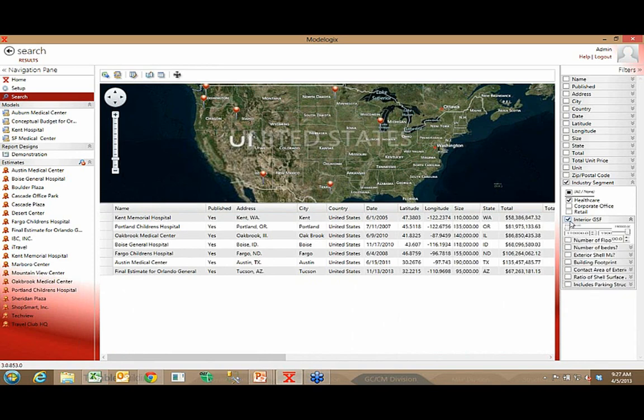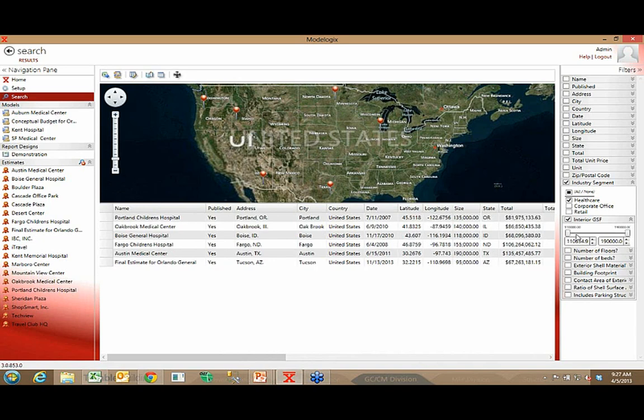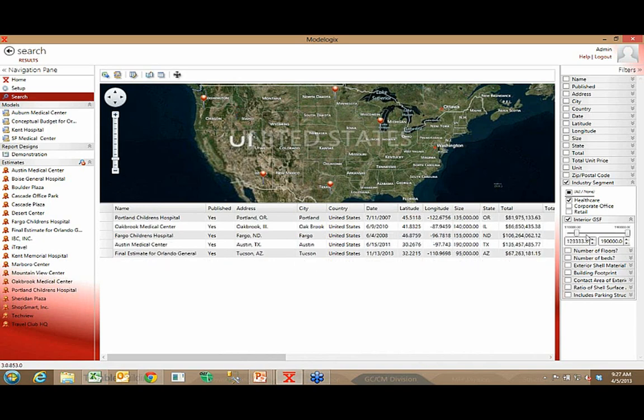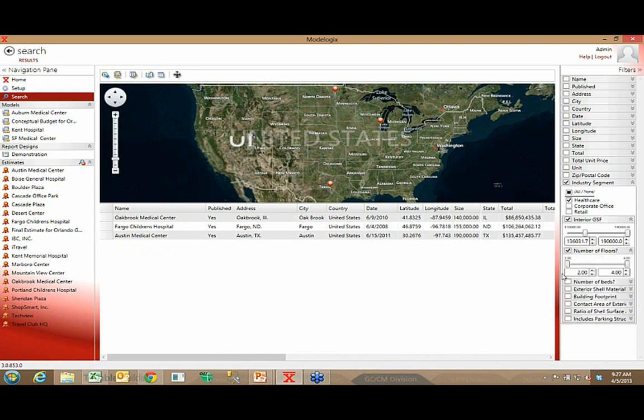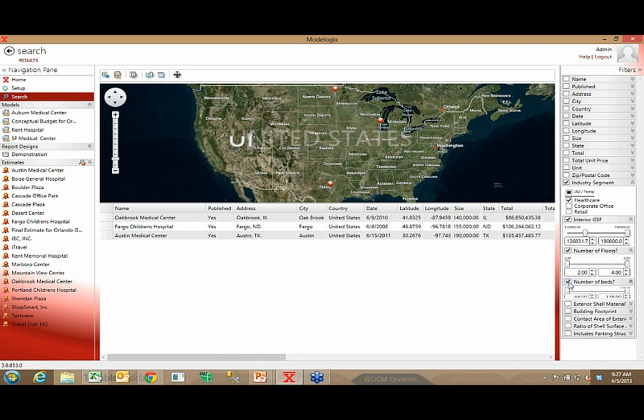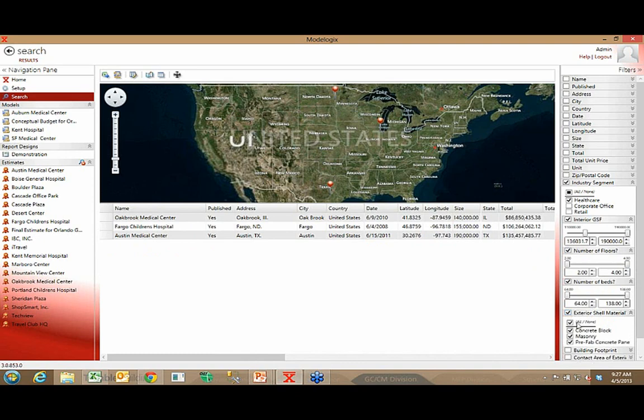I can tell the system I'm looking for projects that are greater than 130,000 square feet, and so forth. I could continue down my list of attributes and say that I'm looking for projects that are between a certain number of floors, a number of beds, where the exterior skin of the building was a certain material type. I can filter, filter, filter until I find a group of projects that are similar in scope to the opportunity that's currently in front of me.